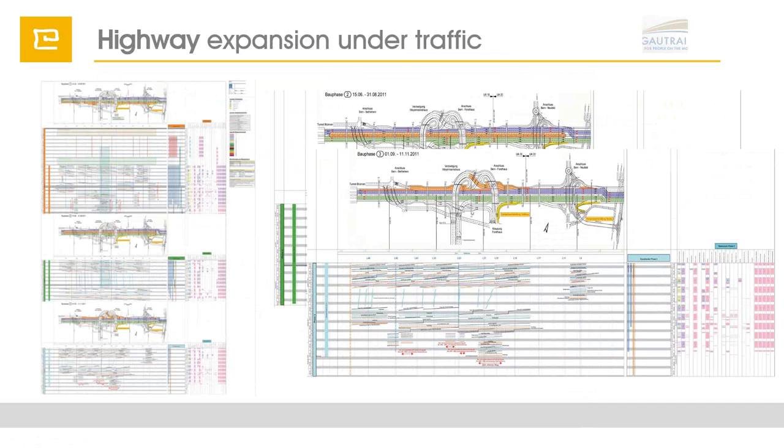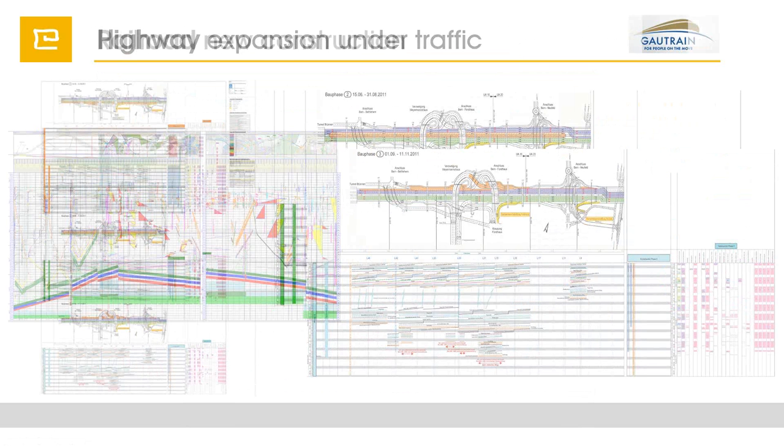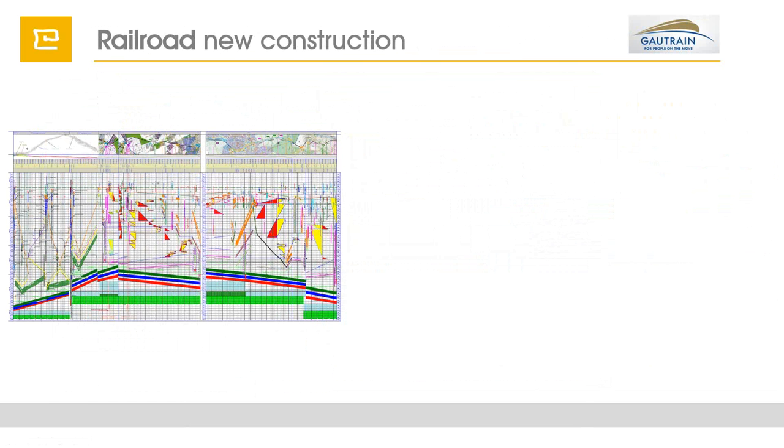This is the overview plan of the Bombela train in South Africa. This is a railway project that was executed by a French consortium, and at the beginning they first made a plan in TILOS containing about 1,200 activities. They pushed this later to Primavera because this was a must based on the owner, and from these 1,200 activities in TILOS they grew it up to 30,000, containing all the contractual microtasks.